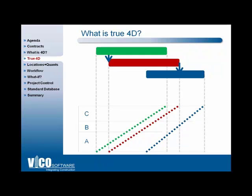So the flowline, the figure below the Gantt chart, we can see, well hopefully you'll have watched BIM 101, the webinar. If not, you can watch it in the archives after this. But we can see how the lines are represented first as just a straight line through which the locations they work. And this is a direct representation of the Gantt chart. And in this example we're showing that the assumption of progress throughout the Gantt chart bars will actually be linear. However, we are all aware that construction is very varied and it is rarely the case on site. So we know that each task will take a different amount of time depending on the amount of work that's there and the level of resource that we plan to use.